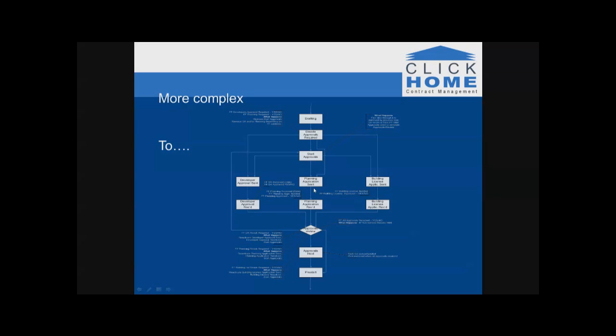And based upon that answer, you go through those tasks, you'd send, you'd receive, and then you come into a task, approval review. And based upon whether you receive the approval or not, you could then loop round and start that process again. And that loop process is another type of workflow concept.